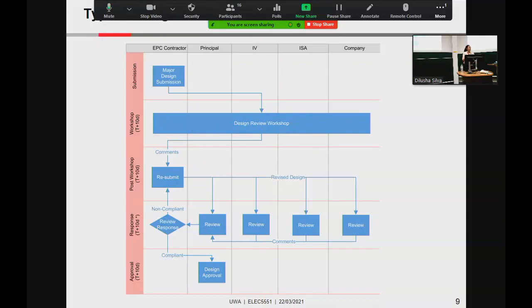sometimes in a company, with a smaller system, you can manage within the company, 20 people. Sometimes we have to book a conference room in a fancy hotel for 2 days to go through the design. So afterwards, we receive an Excel sheet with hundreds of comments. Never, it's never happened, any magical design I haven't seen where the design has been accepted during a workshop.